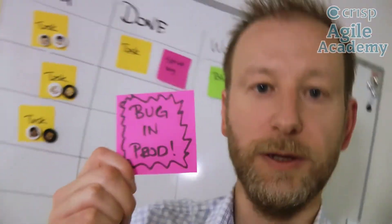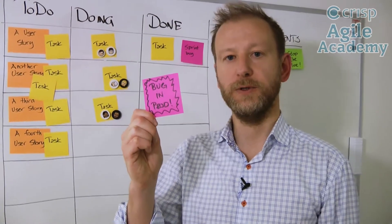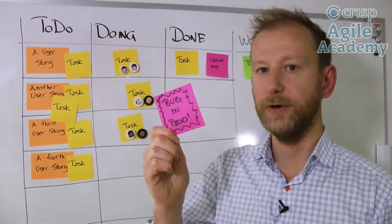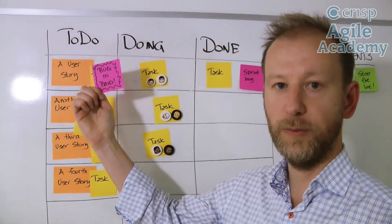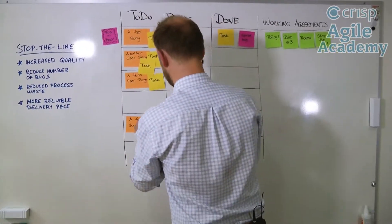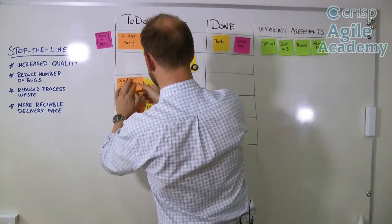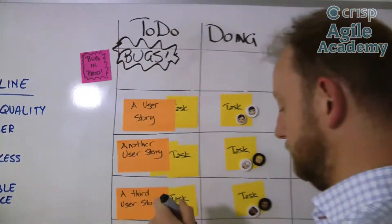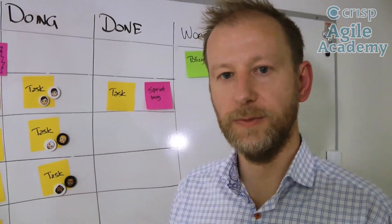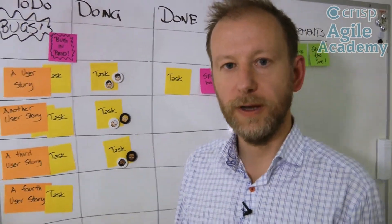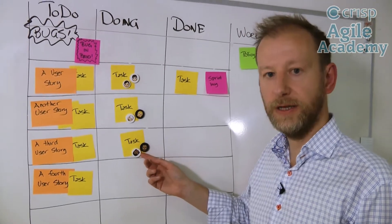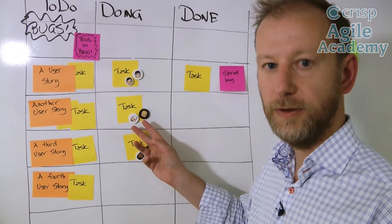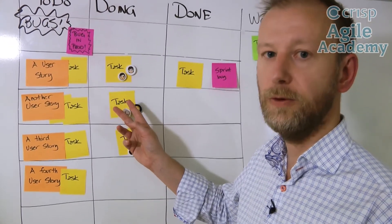Oh my God, someone's found a bug in production — what do we do now? This is where we have to stop the total line. This is the most important thing to fix, so it has the highest priority and must go to the top of the scrum board. We need to fix a new swim lane for the bugs in production. Preferably we stop the line of those who are working with the least prioritized user story, but if that's not possible, really any pair can work on it. It's more important to fix the bug in production than to put more features into an already malfunctioning system.